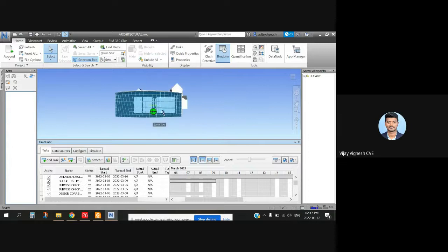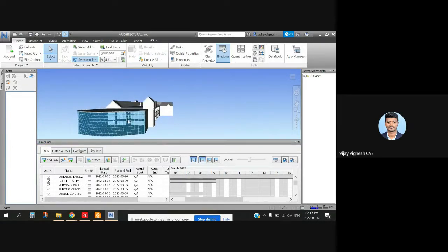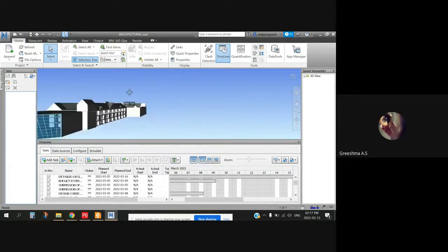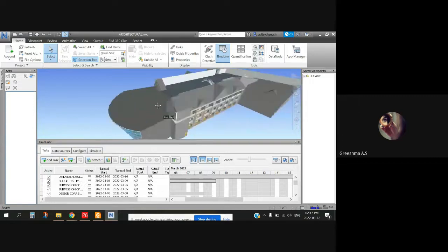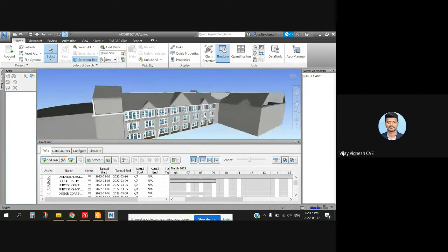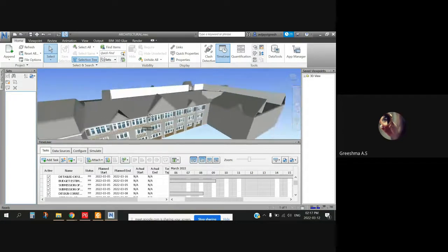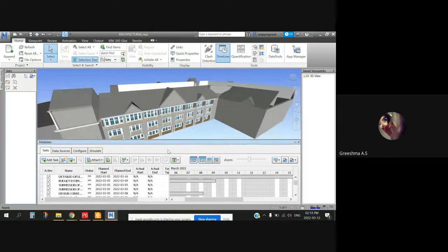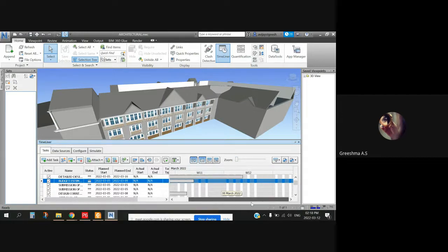For the project, we can do it in Navisworks, and then we can go to Primavera, and once we are done with that, we can feed the data here. It goes like this. First of all, you want a Revit project, the Revit model. You take that Revit project and then create the Primavera schedule. Here we have mechanical, electrical, and structural, so your activities will be according to this project only. Keep in mind that the 3D model should match the Primavera detail. Only after completing these two can we go to Navisworks and do the 4D simulation.